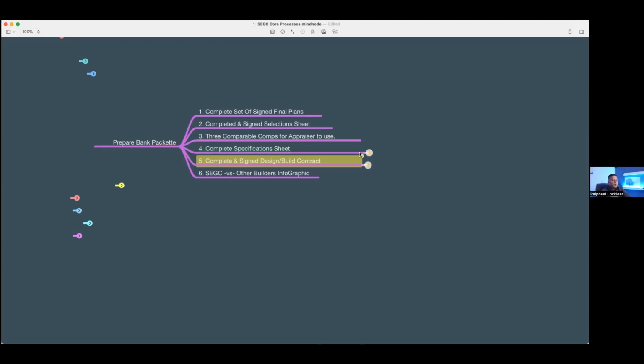So when we're giving a quote, we do that because we want to have peace of mind knowing that we've over-delivered. And we document all of it. That's why we do the compaction test in the footings, in the pad, before the under-slab rough-ins are done. After they come back, we do it again. When you add up all these little extra things that we're doing, that aren't necessarily required, most people building a forever home are going to want to know that their builder is going above and beyond.